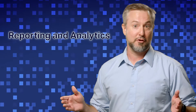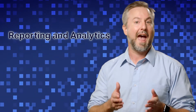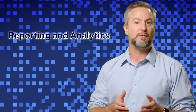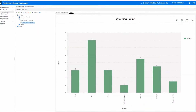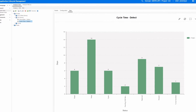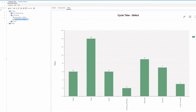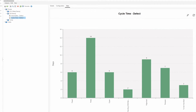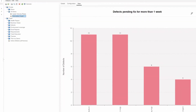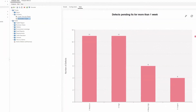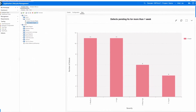Following the composite graph and trend graph introduced in ALM 15.5, we are adding more useful graph types in the 16.0 release. The cycle time graph gives you the power to analyze elapsed time, such as time to resolution, to identify bottlenecks and inefficiencies in your application delivery process. The anomalies graph lets you identify work that has been stuck for an extended amount of time to avoid delays.